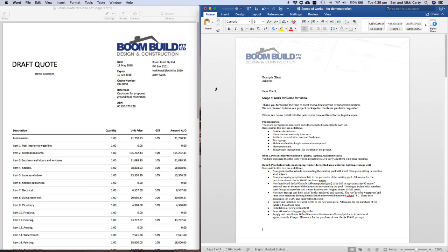That insurance can take anywhere from 1 to 2 weeks to come back, and once that insurance document has been received, it can then get forwarded on to either the private certifying authority or council, whoever's going to be overseeing the project, and that can then be allocated to all their documentation, in which turn we await the construction certificate. And basically, once we've had the construction certificate, we can then commence works on site.